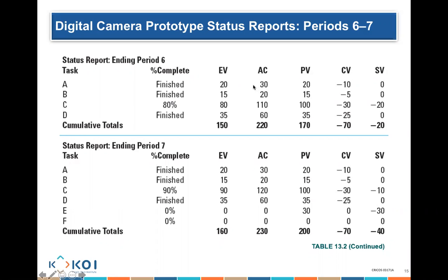So if you want to see whether you are, let's say, over budget or under budget, you can make earned value divided by cost. If you want to know whether you are ahead of schedule, you can do earned value divided by my planned value. So instead of giving you a number like this, it will give you an index over 1. If it's under 1, that means it's bad. If it's over 1, that means it's good.